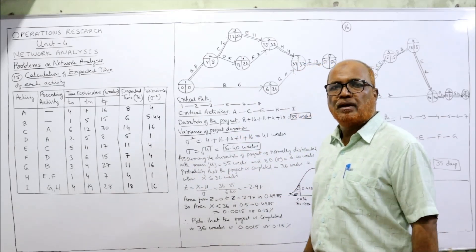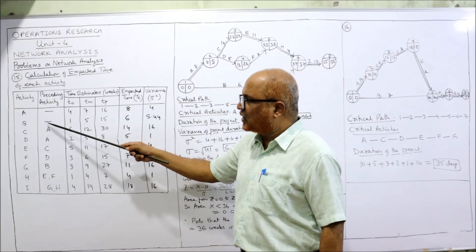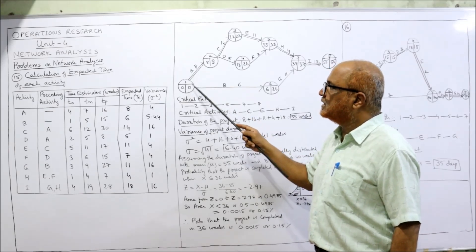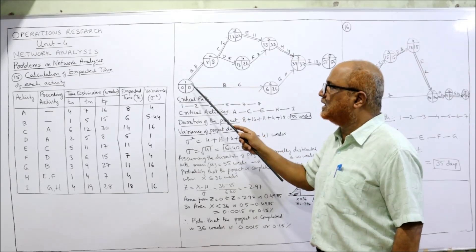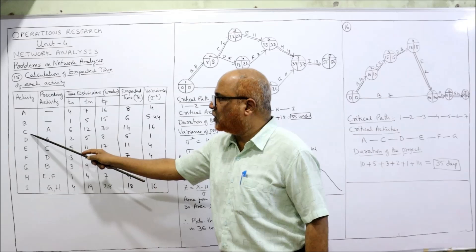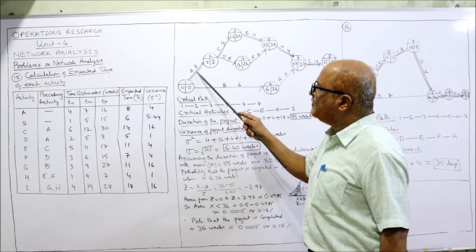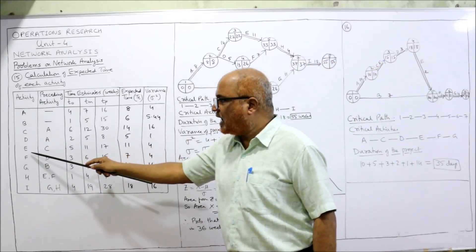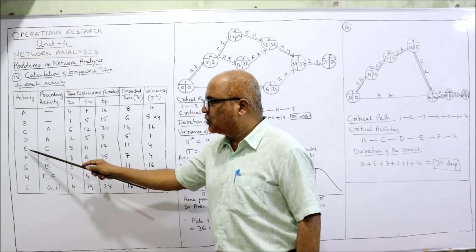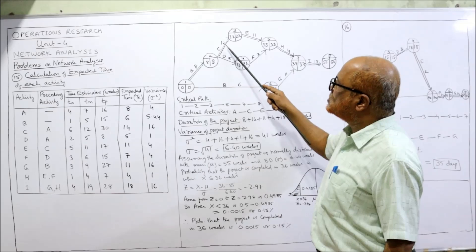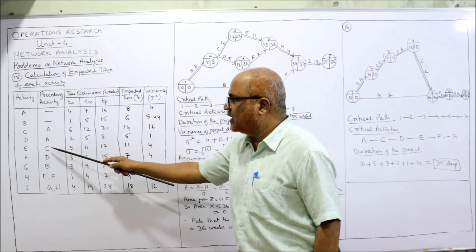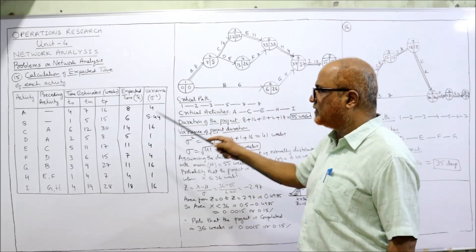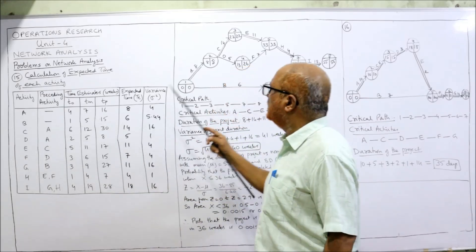Now we start drawing the network diagram. There is no predecessor for A and B, so both activities start from the beginning at event 1. Activity A goes from event 1, activity B also from event 1 — A and B start simultaneously. Then C follows after A and D follows after A, so after A two activities follow: C and D. E follows after C and F follows after D.